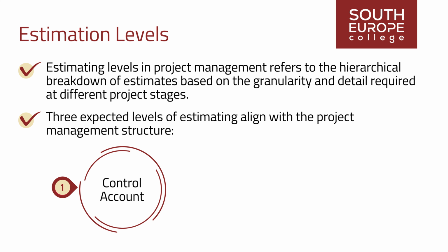Control accounts are used for higher-level project planning, monitoring, and reporting. They provide a way to aggregate and control costs and progress for related work packages. Control account estimates are generally high-level and are often based on historical data, expert judgment, or parametric estimating. The goal is to provide a reasonably accurate estimate for related work packages.